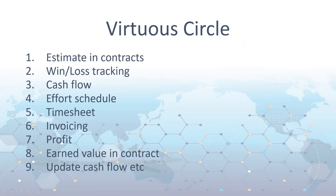You can assess the earned value from actual timesheet entry — how far have you progressed along the deliverable? You may have 100 hours estimated, done 50 hours actual, and think that's 50% progress — but you might only be at 30%. That means you've only earned 30% of the job. You've got a schedule, an actual, and an earned value. That earned value analysis enables you to update both the effort and cash flow of that job.